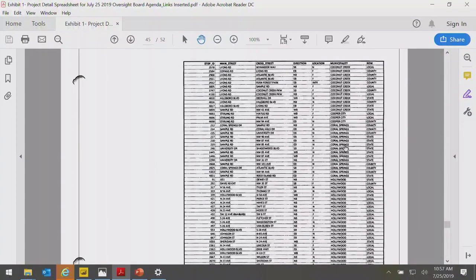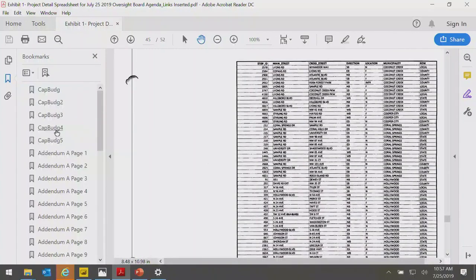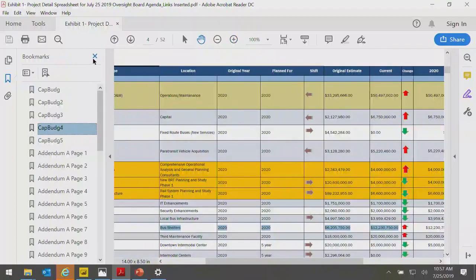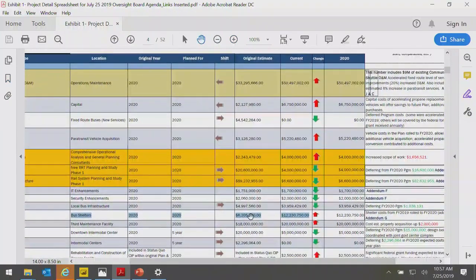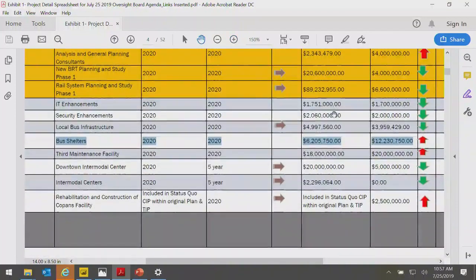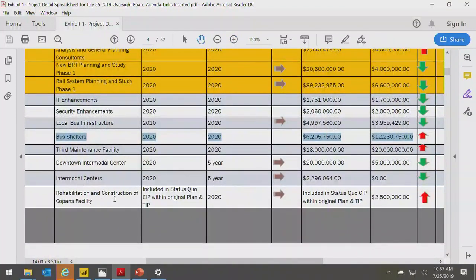Additionally, the very last project that you see is under new transit infrastructure. It is the rehabilitation of our northern operating facility. Right now, we're asking you for $2.5 million. That all told would be about a $62 million project. 2 things I want to make you aware of. We have applied for a federal capital grant of $20.5 million that we hope to receive in the next few months that hopefully will offset the cost of that project by 1/3.